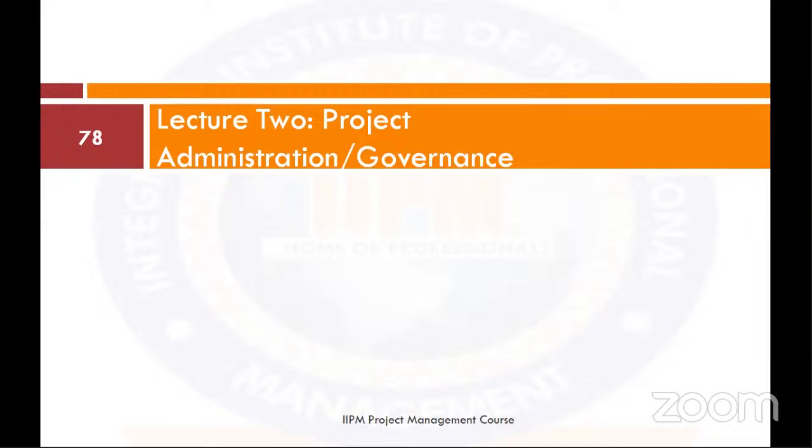Then we have the organizational cultures and styles. Organizational cultures and styles are reflected in shared values, norms, beliefs, expectations, policies, procedures, authority relationships, and so on. For example, a project manager with a highly participative style is likely to encounter problems in a rigidly hierarchical organization, while a project manager with an authoritarian style will be equally challenged in a participative organization.